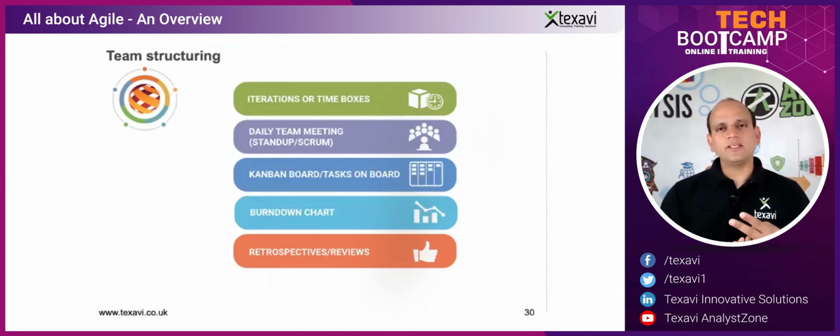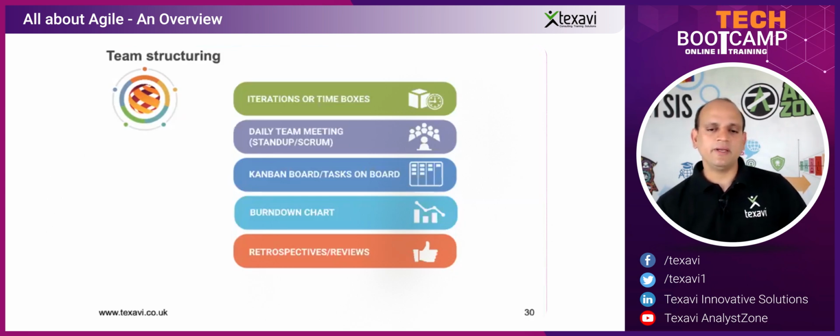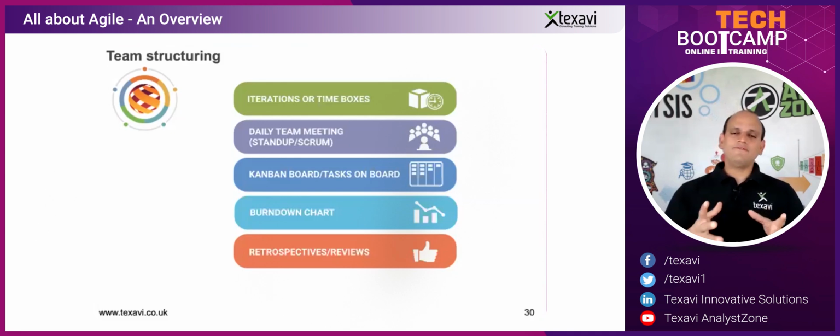And then the third one is how can we improve on this in the next sprint so that we don't repeat this? What are the lessons learned, the best practices? Those are the 3 things that you actually discuss in the retrospective. So understand the sprint review is about the product you're trying to develop. That's called the sprint review.